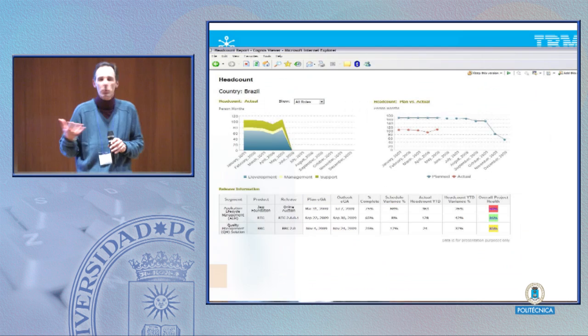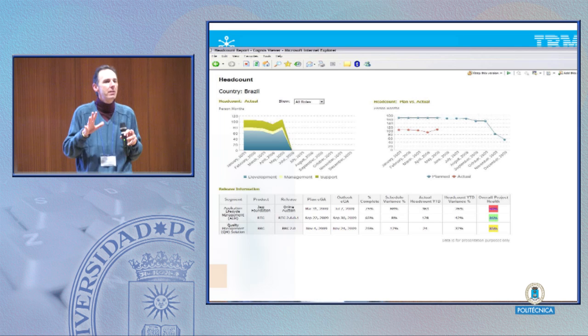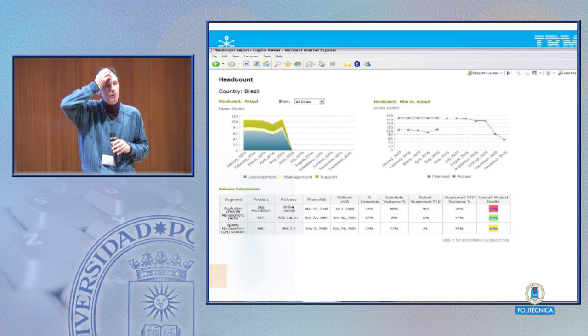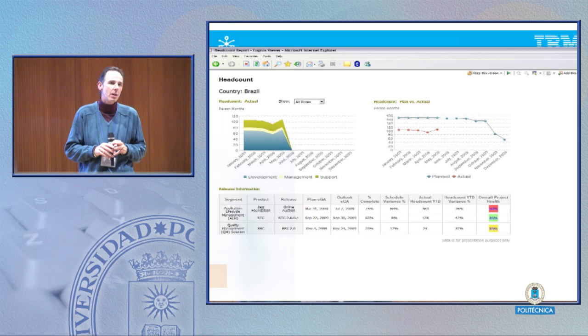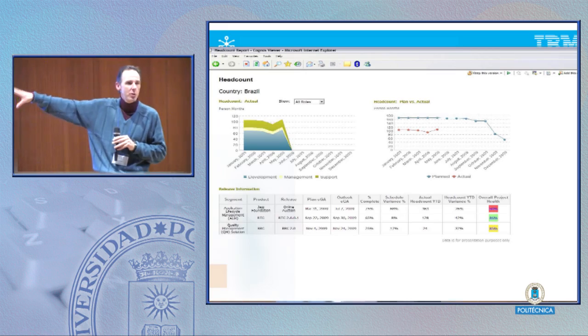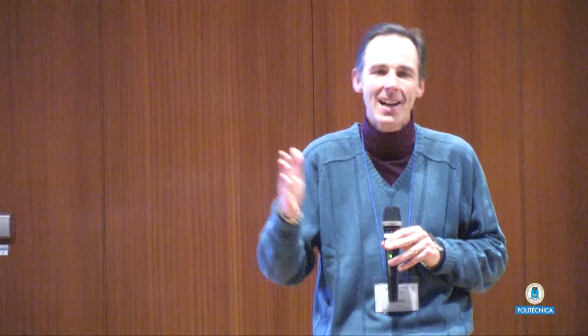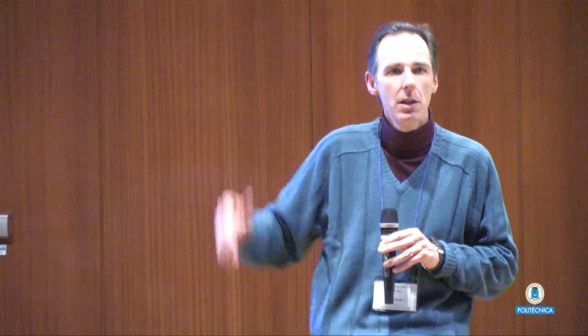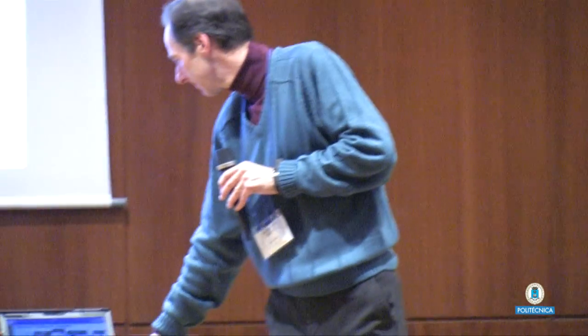The general process we use is an amended version of a sprint, Scrum kind of approach, based on our lessons from projects like Eclipse, where we have a special piece up front, which is to understand what we're doing, and a special piece at the end, which is we have to harden this up for delivery. There are points towards the end where nobody can suddenly start a new build or a new stream. You suddenly can't decide you want to break some of the sign-offs. Things become pretty important. So we tend to work in this kind of style. Again, we can talk at another time in detail about how this works.